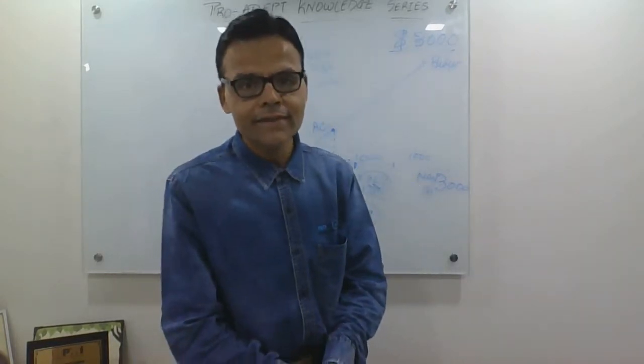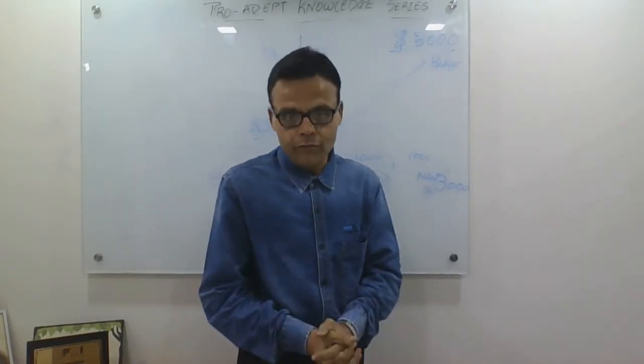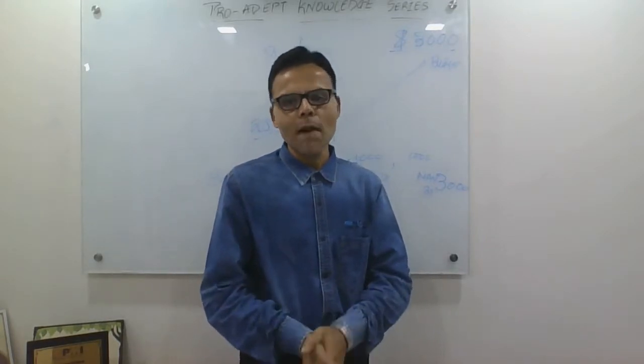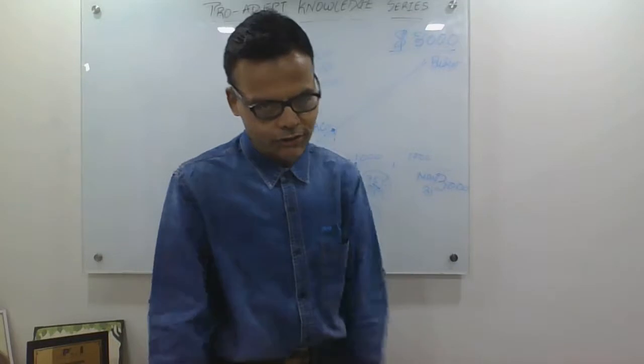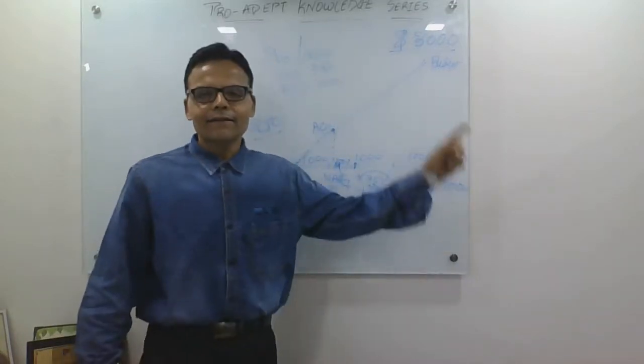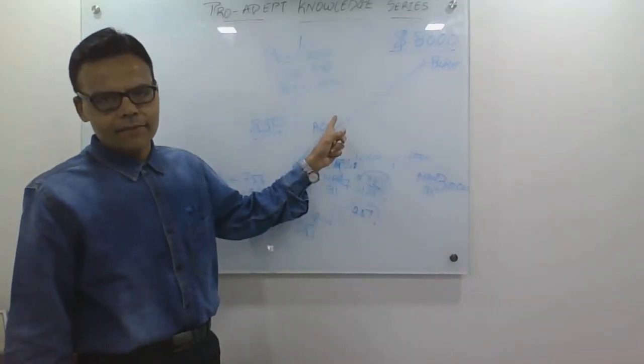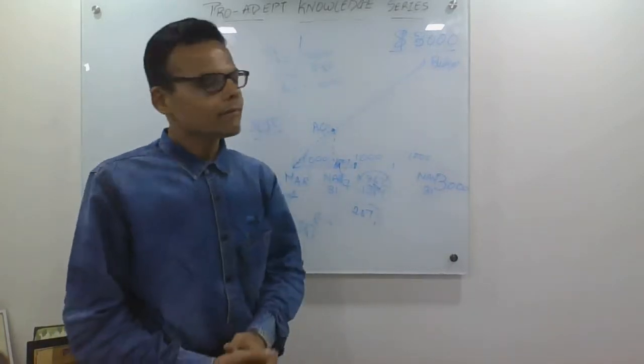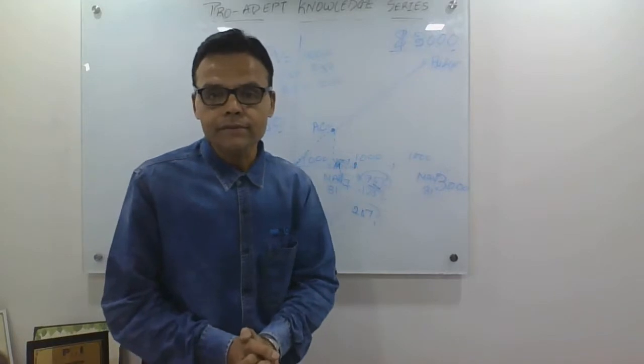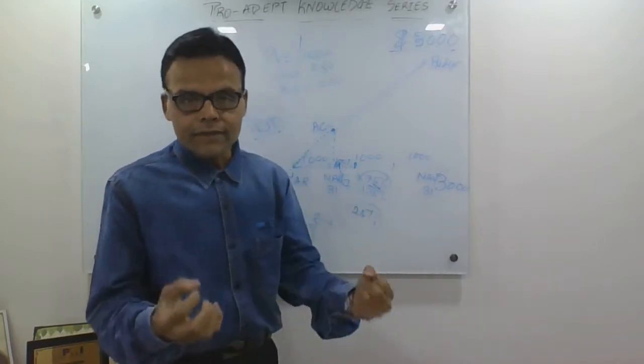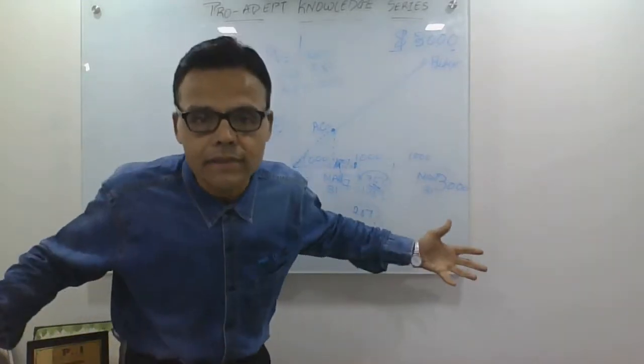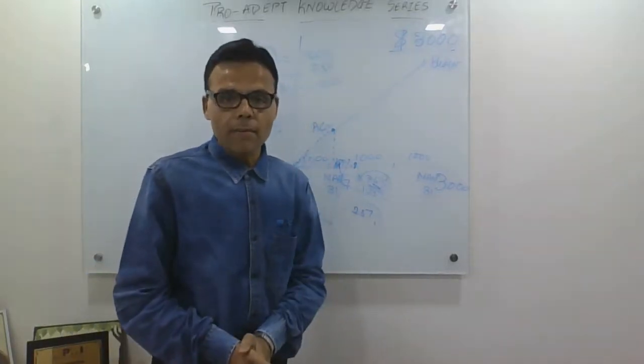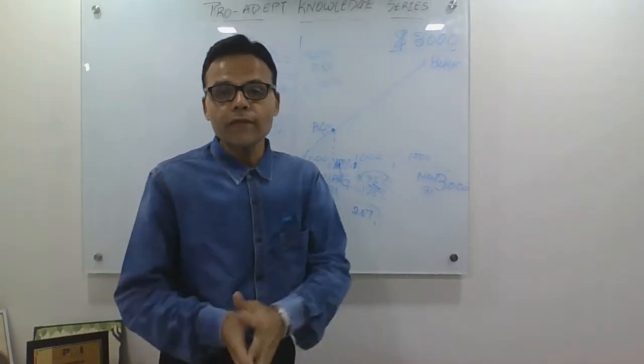In case you have missed the first and second part of the video or this series, please ensure that you go back to my previous videos and watch. This is where we left last time, where I explained the concept of earned value. I explained what happens when your work done is only 75%, you are over budget by 25% or absolute 250 number, and you are behind schedule by 250 or 25%.